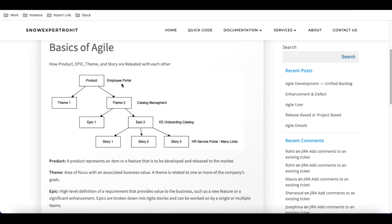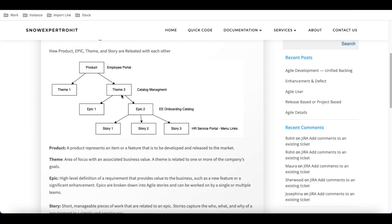If you look at the example on the right side, the employee portal could be a product — you are building the employee portal. After product, we have a theme. A theme is a focus area with associated business value, related to one or more of a company's goals. So the employee portal product might have a theme called catalog management.